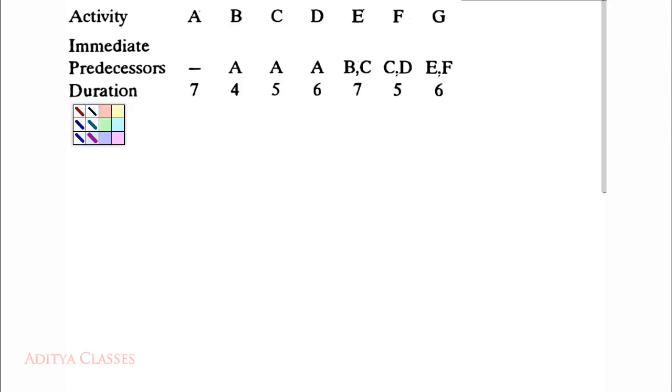What do we analyze before starting the network? Who starts my network? All the activities that do not have a predecessor. If we have a look at A, A does not have a predecessor.